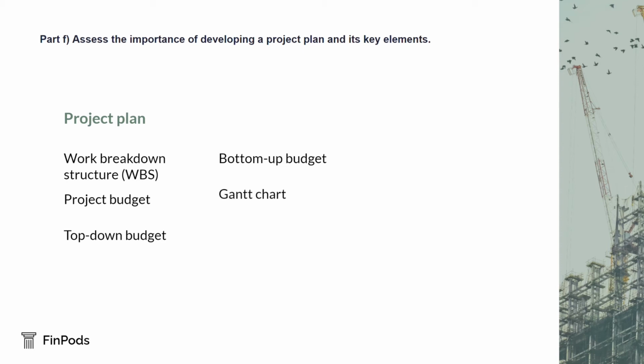Gantt chart shows the deployment of resources over time. A Gantt chart is a horizontal bar chart used to plan the timescale for a project and to estimate the resources required. A Gantt chart displays the time relationships between tasks in a project. Two lines are usually used to show the time allocated for each task and the actual time taken.